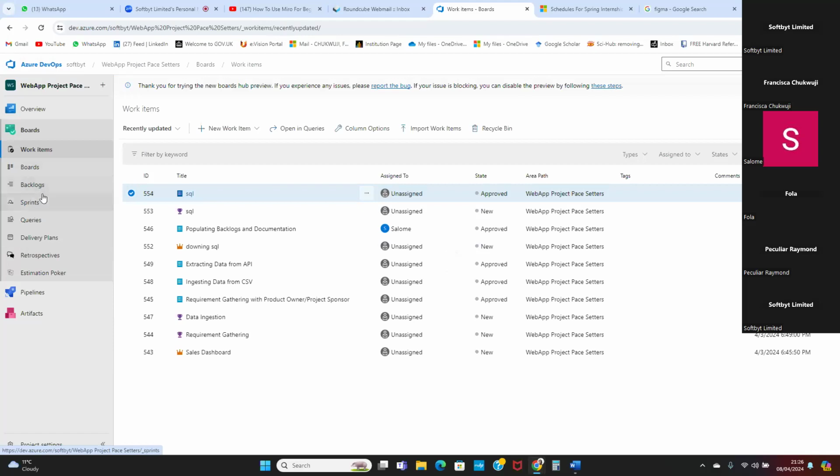Okay. So the backlog now is where you said we can create the, what did you call it now? The populating your board. Populate the board, yes. So you said if we want to create, we go to new item, then we first create the epic, which is like the main heading of the work that we want to do. After that, we start creating the features and the product backlogs for the work that we want to do.